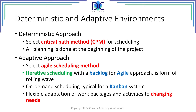In an adaptive approach, we use an agile scheduling method. The way of scheduling is iterative. A backlog is created in which you find all the activities and tasks to be completed. This is typical for an agile approach and is a form of rolling wave scheduling. There is also the possibility to schedule on-demand, which is typical for a Kanban system. Flexible adaptation of work packages is possible because we can adjust flexibly to changing needs.